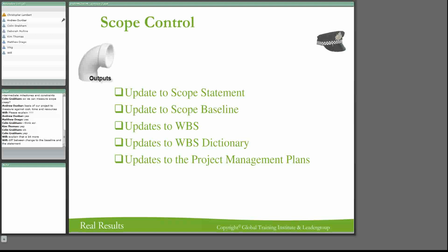When you finish your detailed planning, you're going to have a baseline. And we said your baseline becomes a tool for verification. If you start getting too many changes within it, your baseline is going to say to you, hey, this is where we should be, and this is changing. That means the project is changing too dramatically. And there might even be a bailout point where you say, hey, this project is not going to be viable anymore. And that really comes down from your baseline. But if there is a change, what you want to do is also change your baseline to another version.